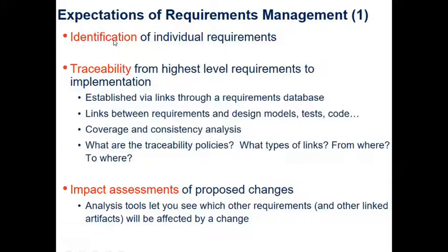Expectations of requirements management. What are some expectations that we can have in the requirements management process? You have identification, right? This is where you expect that you will be identifying individual requirements. Traceability, from highest level requirements to implementation. Established via links. So traceability is established via links through a requirements database.